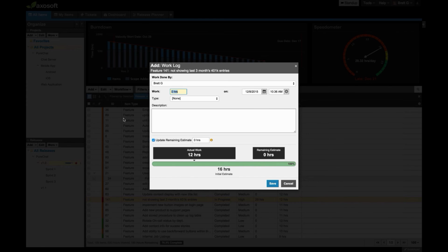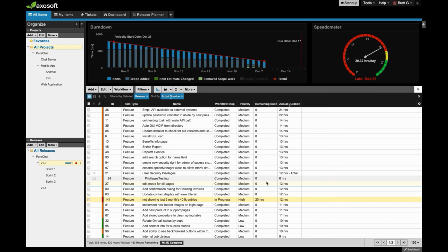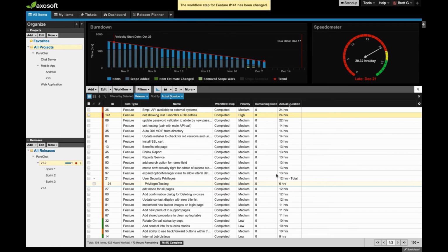do you still think that that story was 2 story points worth of work? If it was, great, just enter that same time. If you're like, okay, well, actually, now that I'm working on it, it was really more like 3 story points, then when you're adding that there, it's a really good way to validate how good you are at estimation.